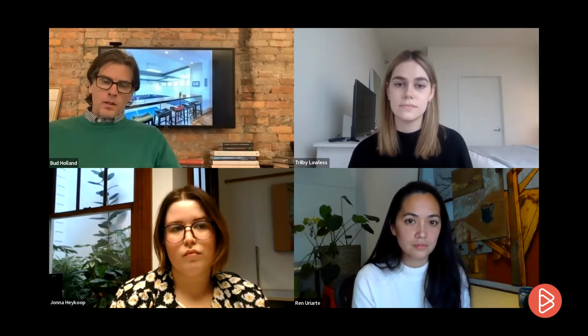Ren has set up some places for us to keep tabs on consultants' proposals versus actuals. At the beginning of a lot of our projects, we'll make some assumptions about consultant costs based on what we know about the project at that time. And then as we move through the project, we continue to keep track of that and update it in our monthly project manager meetings, just to be sure that we're staying on the rails in terms of the overall cost, because any big change in a consultant cost obviously affects the bottom line. So you just need to be able to adjust and factor that in as you're moving through a project.